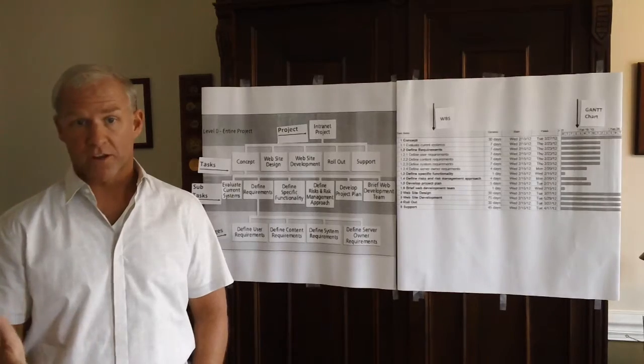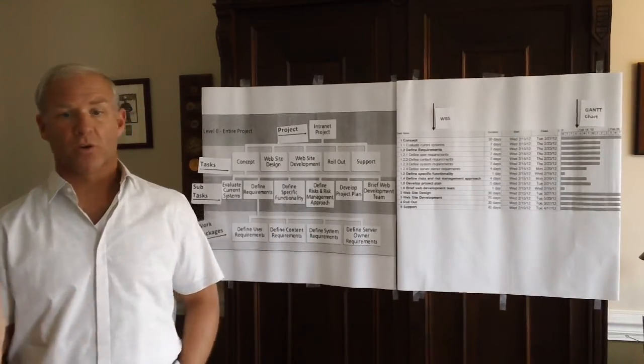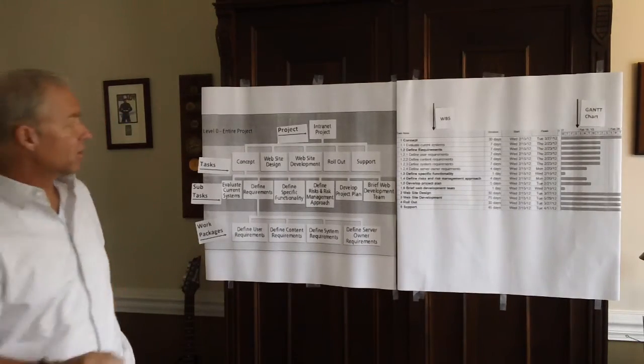Now, under this auspice, PMI, Project Management Institute, lists a few rules that will help significantly when developing a work breakdown structure, which are: the first level is completed before the project is broken down further. Each level of the WBS is a smaller piece of the level that's above.